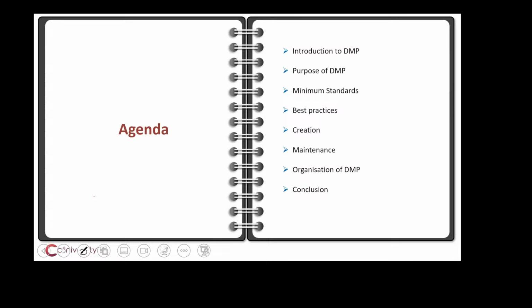They found that creating this kind of document right at the start of the study provided a value add beyond its function as a reference for auditors. It forced the study team to plan the work before it was even carried out. And these documents were also more accurate when they were written at the start of the study than as a summary report at the end of the study. So these documents summarizing all the data management activities were called the data management plans or the data handling plans.